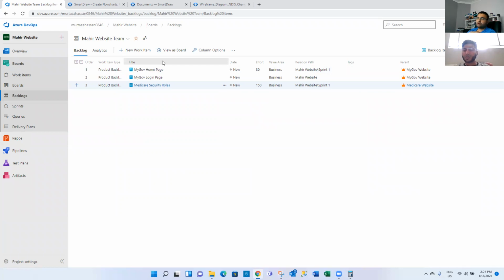Perspective or what we call? Yeah, it's just a daily stand-up meeting. Every day you stand up and say what you did yesterday, and what you're working on today, and then whether there's a showstopper. For example, we haven't identified that we need more security roles. Parent and child is not enough. We need another security role, and therefore we can't make the security role in the database right now because it's just not possible, because we need more information. So we might have to put this on hold for now. Okay. You know what I mean?